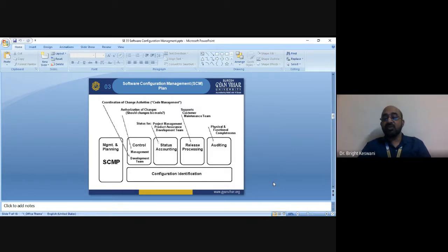For any particular project, the change control board includes some individuals. It includes the executive sponsor, the customer or end user representative, the marketing representatives, and the program manager and project manager, who also serve as the change board coordinator. Then the quality assurance manager should be in the team, the engineering lead should be in the team, and the quality assurance lead and documentation lead should also be there.